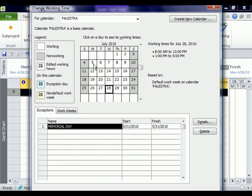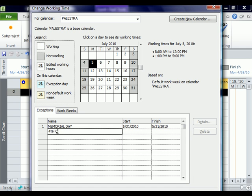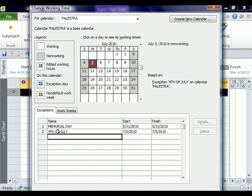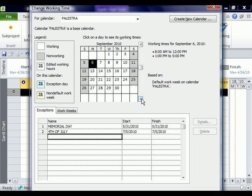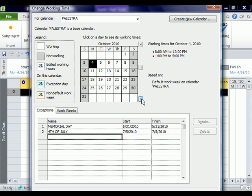Also, the 4th of July this year actually falls on a weekend, so most companies actually give you the 5th off. So I'm going to type 4th of July, even though it's the 5th, and hit enter. Now the 5th of July is non-working, and so on. Now be careful, this calendar scrolls really quickly. As you saw, I probably blew past the Memorial Day one there by accident. But when you go through this, you'll want to just mark off days and make sure that everything is lining up.